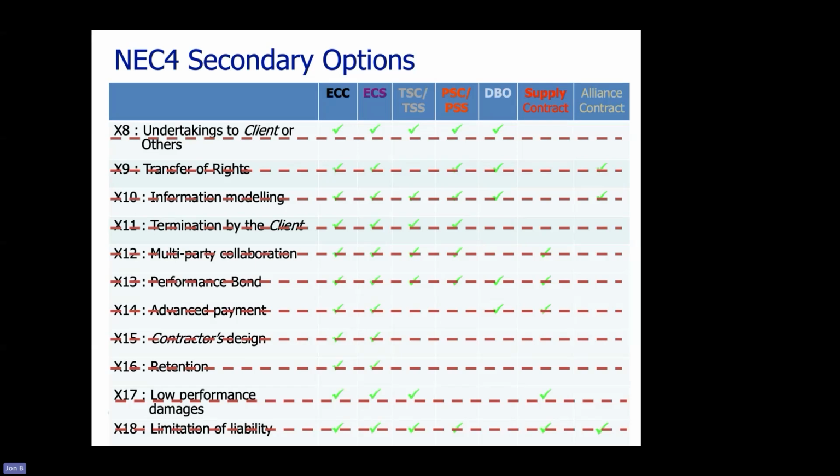Yes. Well, so the most obvious one is you'd either have a parent company guarantee or a performance bond in place. And if the contractor went bust, you would, through the termination procedures, say, I am terminating because you've become insolvent, which is one of about 7 reasons. The first 7 reasons are basically because the contractor has gone bust. I don't understand the nuances between insolvent and an appointed administrator or whatever, but they're there.